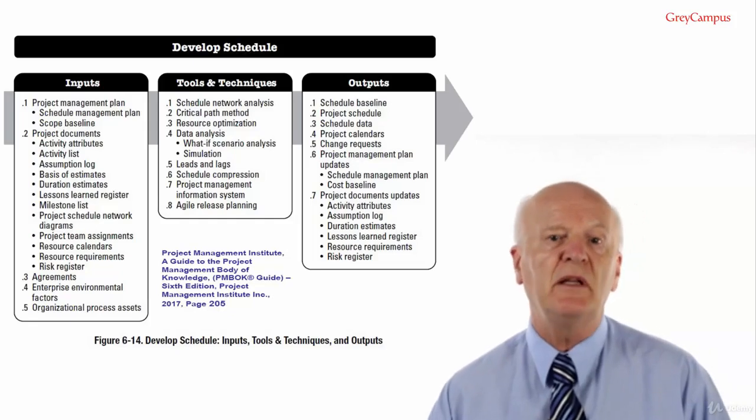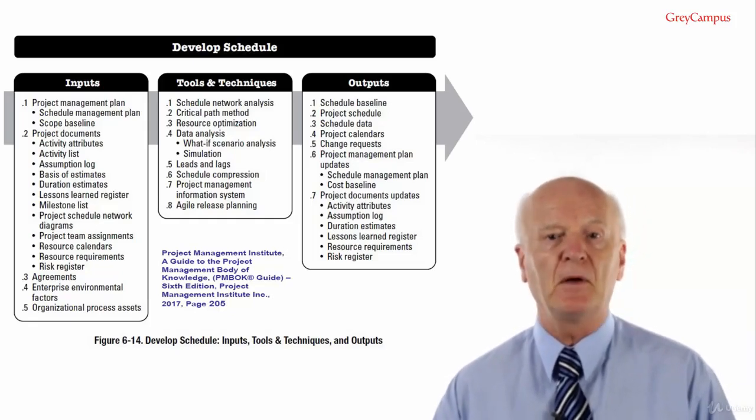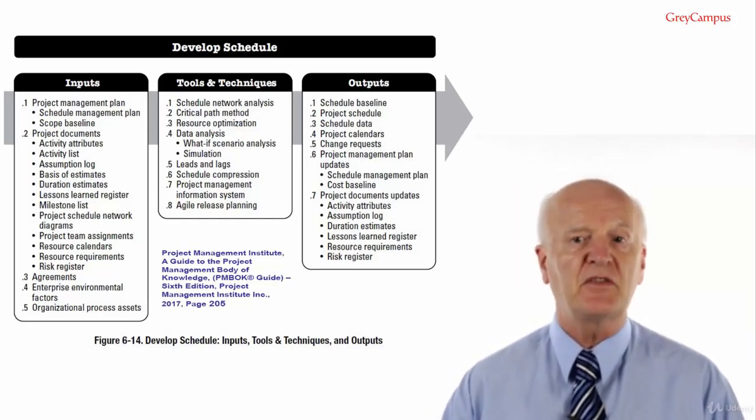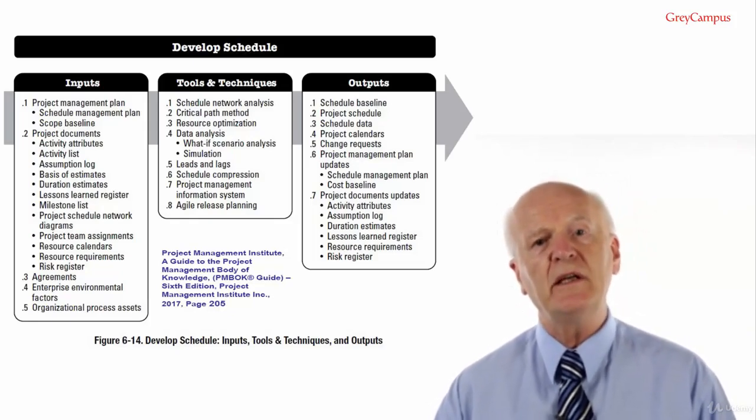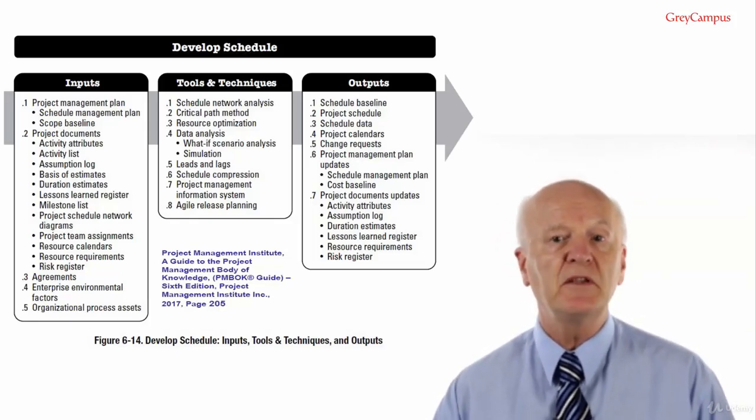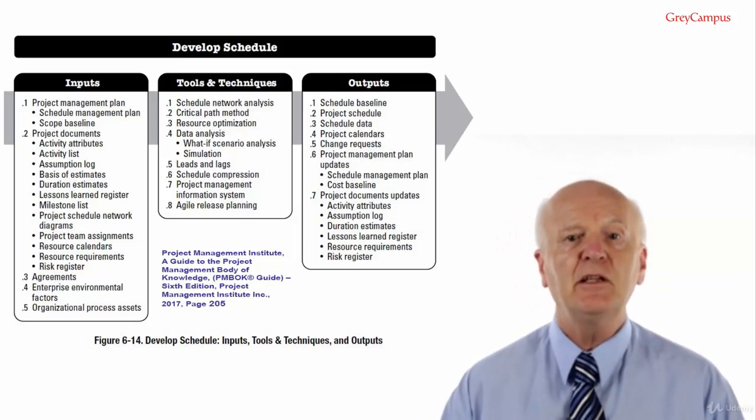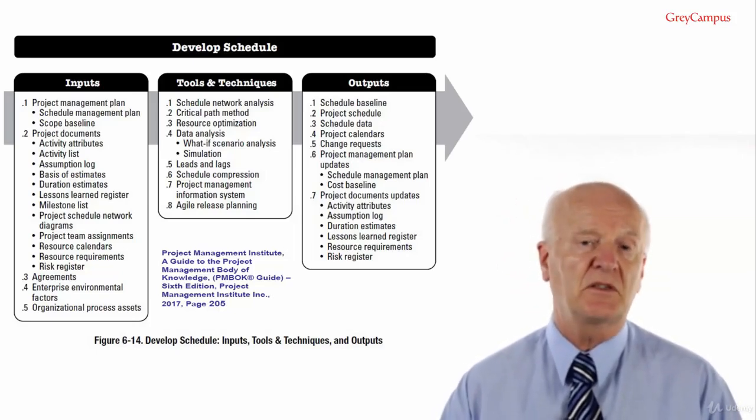Whenever you see the word simulation on an exam, expect to see Monte Carlo in the answer and vice versa. It is used to determine ranges of start and end dates and ranges of possible critical paths and their probability of finishing on certain dates.